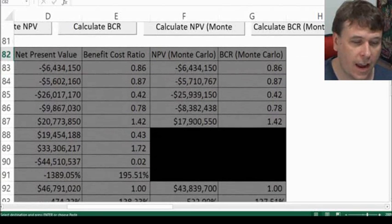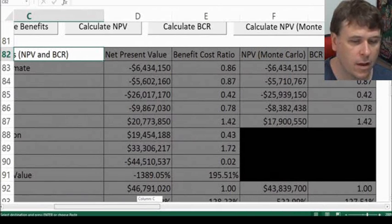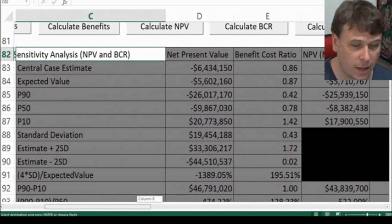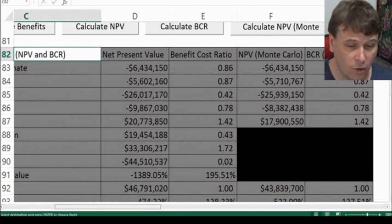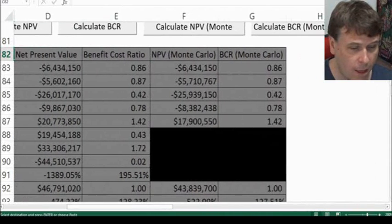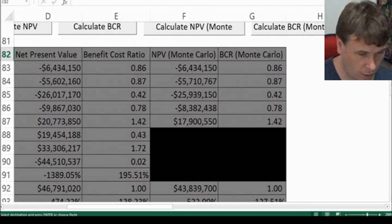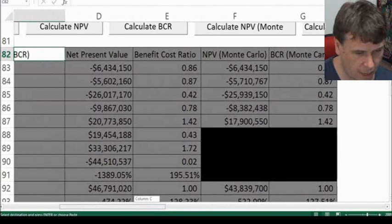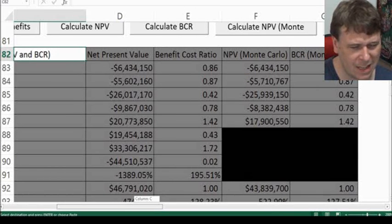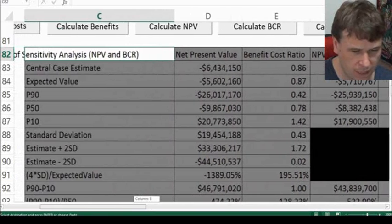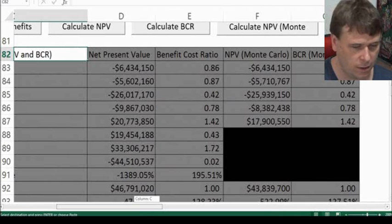Let's just have a look at the results now and make a comparison. The central case will be the same in both scenarios. The expected value using Monte Carlo compared to using our calculation with probability weights is more or less the same — benefit cost ratio is 0.87 and net present value is negative about 5.6, and about 5.7 using Monte Carlo. The P90, P50, and P10 values are all within the same ballpark, only about a million difference in most results, though the P10 is a little bit different — almost out by about 3 million.